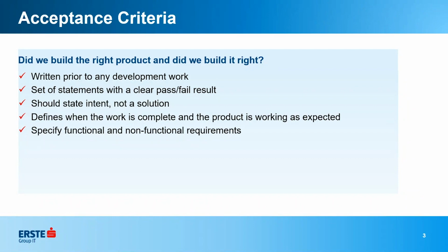Those would be system-wide, and those should not be in your acceptance criteria, because unless you are the team that tests that, those types of requirements wouldn't belong in a user story. The only things that should be included in a user story are things that your team itself can test.